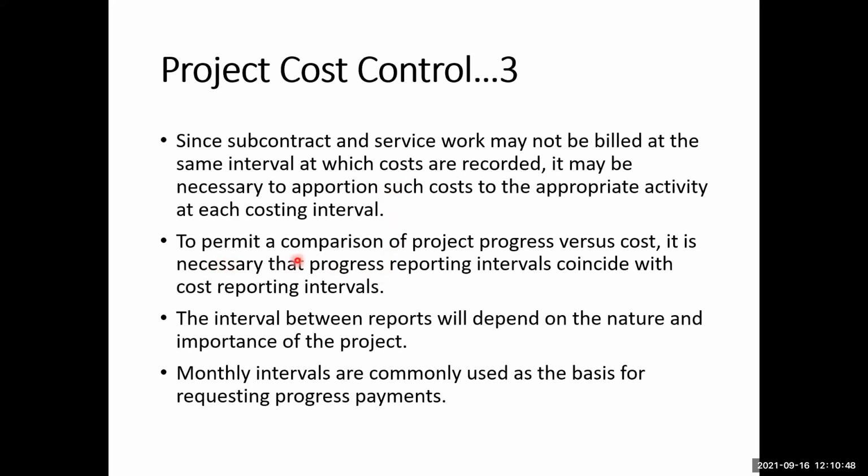To permit a complete comparison of the project progress versus cost, it is necessary that progress reporting intervals coincide with the cost reporting interval. This is a good suggestion, because on a project you set the intervals for the progress reporting.